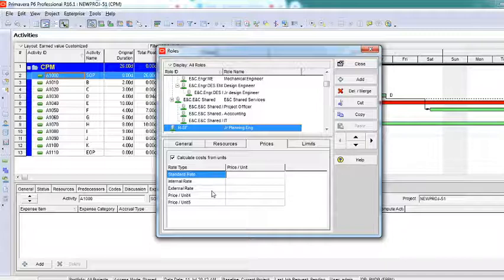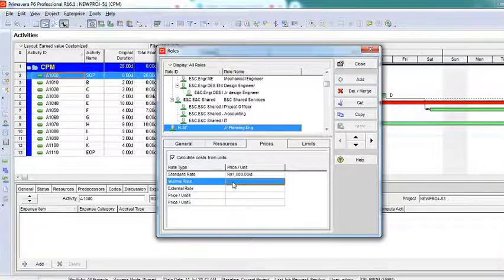Now unit 4 and unit 5, that is again standard, internal, external, the 3. Standard is 1, internal is 2, external is 3. Then after that, if you want some more, that could be unit 4 and unit 5. So you can name them anything you want. That's the reason why they just kept it blank. So you can add 5 rates. For example, I'll say 1,000 rupees per day. You can see per D. D is nothing but day here.